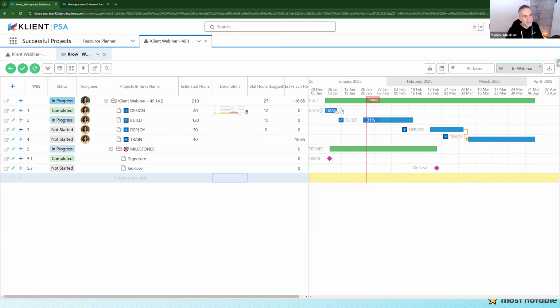Exactly. And in this specific case, you see, I purposely didn't create that linkage between my start and build because I want them to be separate. But when you have those linkages, they're going to follow. But when you don't, then you can do control, select, and move. So this has been there for a while, but yeah, people don't always know.